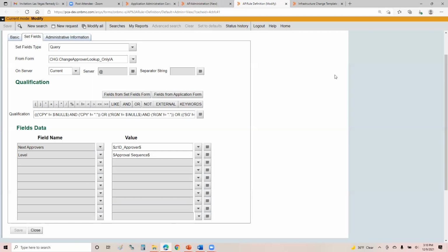And the CAB says, well, let's run through it again. So you usually can run it through 3 times. The CAB determines that you must always get the approval because they're the ones that do it. If this change is going to break something or possibly break anything, I want to prove it. I want to see it, so it'll never go into standard. But if they say, hey, this is not going to break anything, this looks like it's fine, we tested it 3 times, then they make the call that it's standard. So that's the guidelines that they generally use, but I can't speak by situation because everybody does it differently.